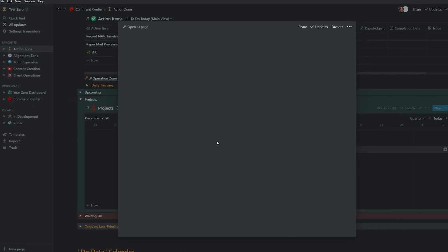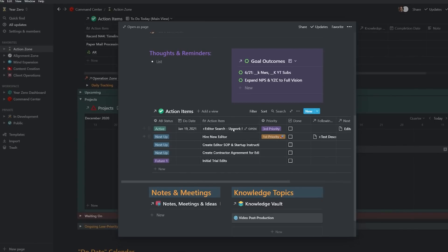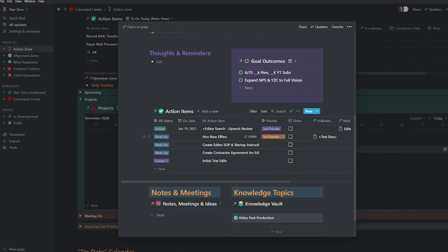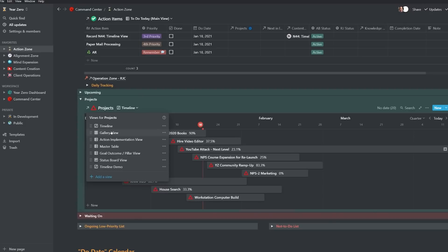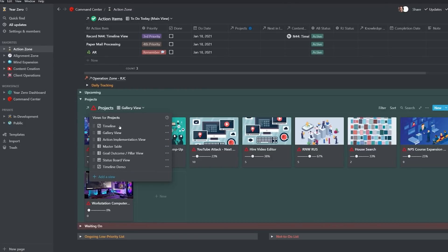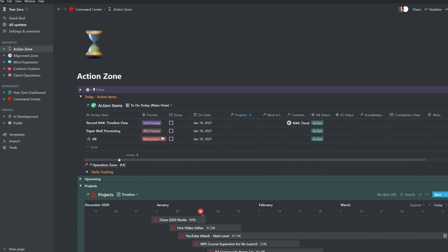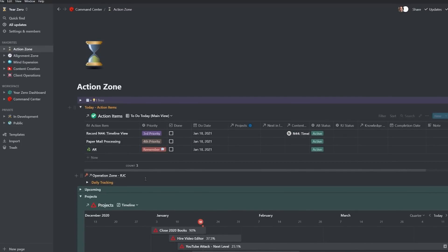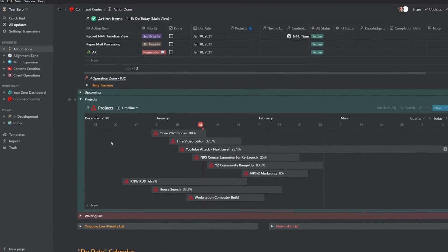I get a really good sense of where I am with everything with my percentage indicator of percent of tasks completed. When it gets to be a high number like 90, it may be nearing completion, or that may mean I need to add some new tasks to map out what needs to be done to get to the finish line. But this new timeline view gives me a great overview of where I am in everything, which I never got with the gallery view. I get so much more information and just as clean, if not a cleaner view of what's happening across my projects with this timeline view.